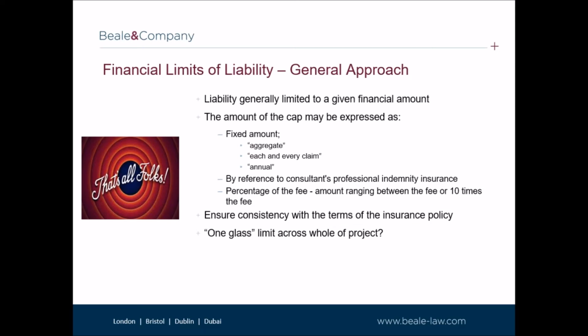There are clear benefits to this. Our view is that such an arrangement is most likely to work. There perhaps is a risk that the limit could be unenforceable under UCTA for being unreasonable, as for example third parties could find themselves without recourse against a consultant where a cap has already been exhausted because of earlier claims. I don't think there's any case law on this issue, and obviously any such arrangement would need to be looked at on a case-by-case basis, and as always, the drafting needs to be done very carefully.